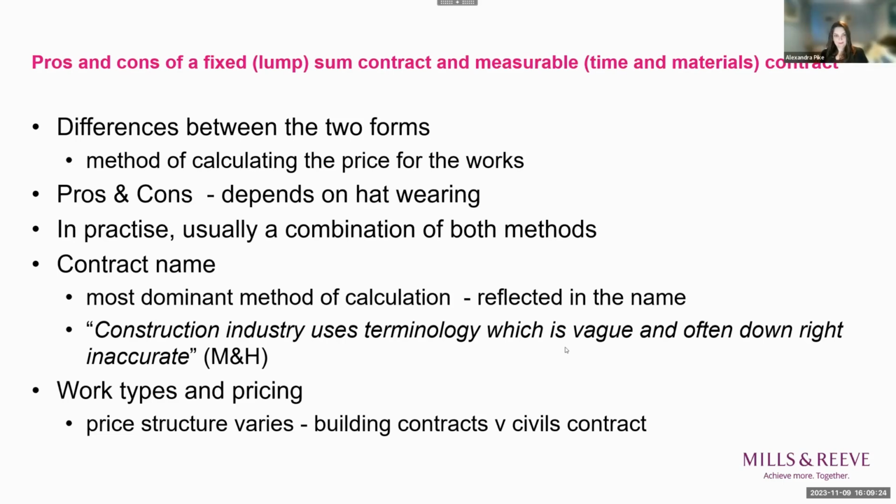But also the contractor's situation is relevant. It will really depend on the workload of the contractor, if they want the job or need the job, or perhaps if there's a chance of follow-on work. So there are lots of variables that will really impact on the price. Essentially, it means the estimated price to be paid by the employer, regardless of the actual cost. However, please note, it doesn't mean that there will be no more costs, because obviously there may be some delay costs associated or variations, which we have seen on a number of occasions do trip up different parties to projects.